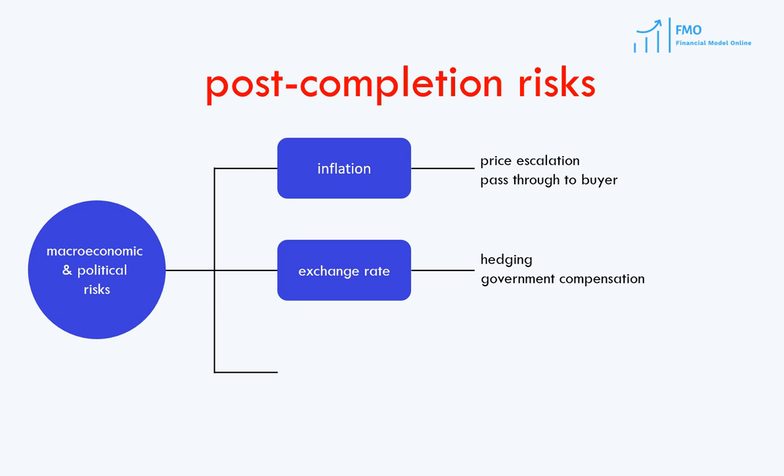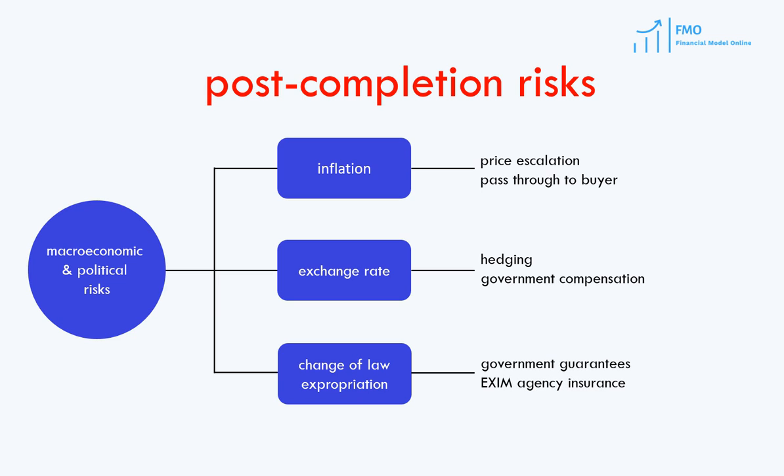Of course, in the end, the off-taker takes the risk of the exchange rate. Often in concession projects, the exchange rate risk is taken by the government, which compensates the project company for any losses from adverse exchange rate movements. Political risk — such as the risk of change of law or project expropriation — is often taken by the host government if the project is under concession, and insurance may also be available from export-import agencies such as US Ex-Im Bank.